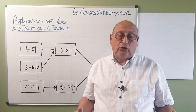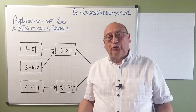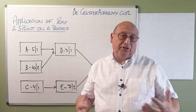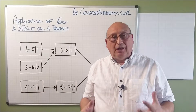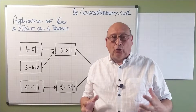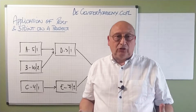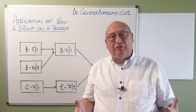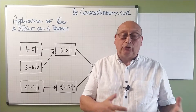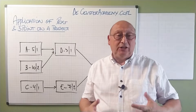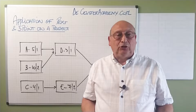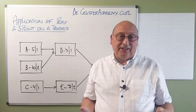Understanding how to calculate the expected duration of an activity and its standard deviation is very interesting. We like to apply this on a project. We have to look at the calculation of every activity. And once we have calculated using PERT or 3-point estimation — it doesn't matter — we find for every activity an expected duration and a standard deviation.